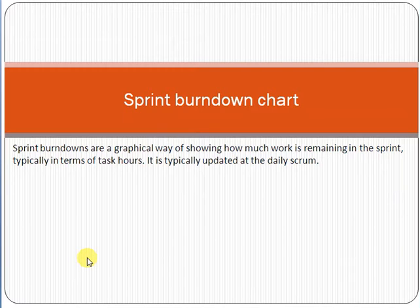A sprint is a three to four week time period. If there are 40 tasks, sprint 1 will contain 10 tasks — we plan, develop, test, and deliver them. Sprint 2 takes the next 10 tasks, again plan, develop, test, and deliver. Sprint 3 and sprint 4 follow the same pattern, until all 40 tasks are completed and the full product is delivered to the customer.